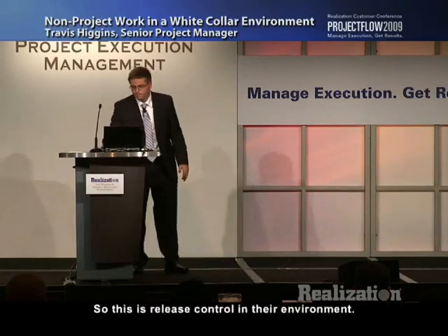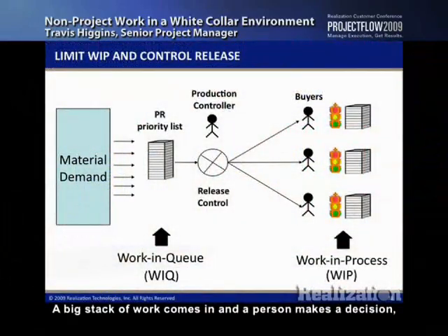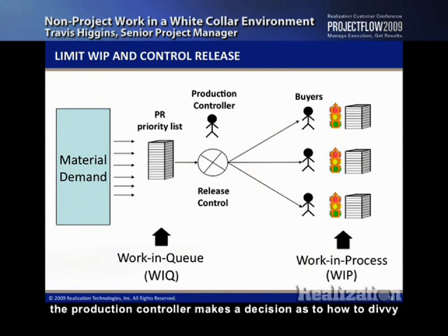Okay, sorry. So this is release control in their environment. A big stack of work comes in, and a person makes a decision, production controller makes a decision as to how to divvy this work out. So that was a change from having the system push the work entirely to the workforce.